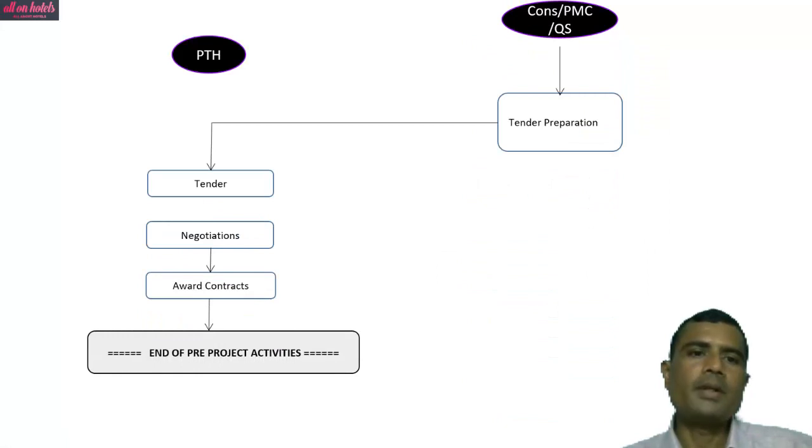Once PMC is on roll, they do tender preparation. Tender is prepared, negotiations are done, and contracts are awarded to different contractors like civil, mechanical, electrical, plumbing, etc.